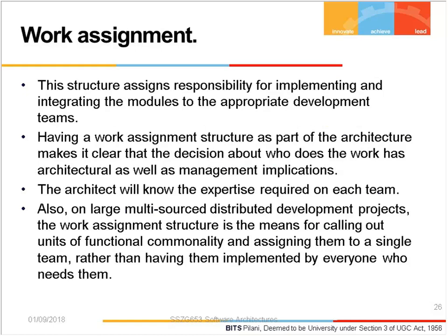Work assignment is a PM's job, but the PM may not be an architect, in which case he has to sit very closely with the architect to be able to break up the job so that the project manager can now give it to various teams. Breaking up the project into teamable work is an architect's job. An architect and a project manager have to work very closely together.